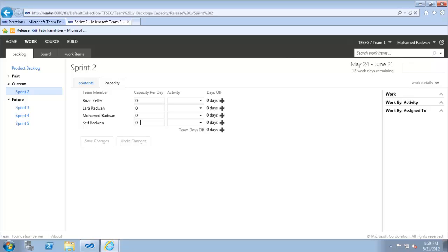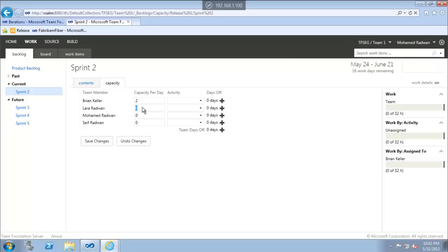The actual units are the main hours that you are working, sitting on the PC, excluding meeting time, excluding breaks, excluding any time outside of your work. So this is the actual units, but the ideal units is the whole units. Okay, so let's start adding time. Brian Kill is a consultant, so he is just working 2 hours per day, but most of the others are normal employees.